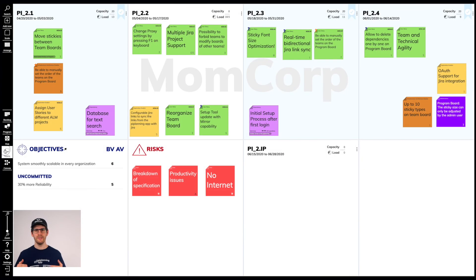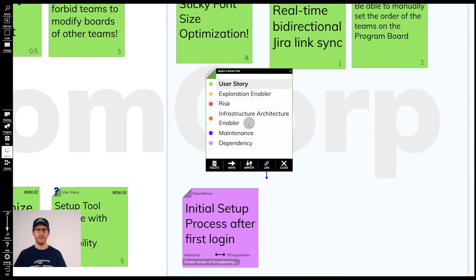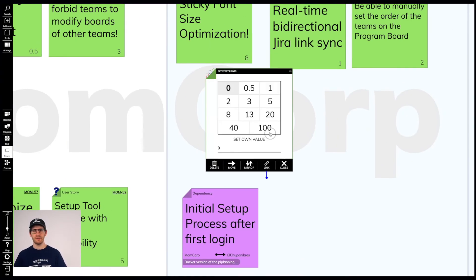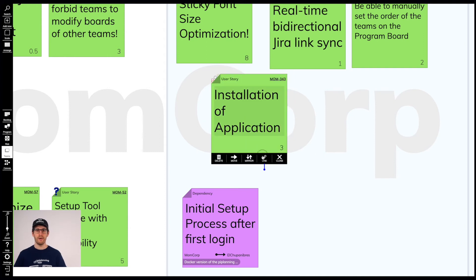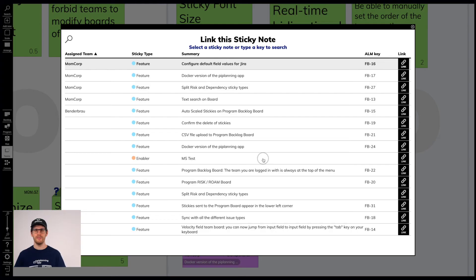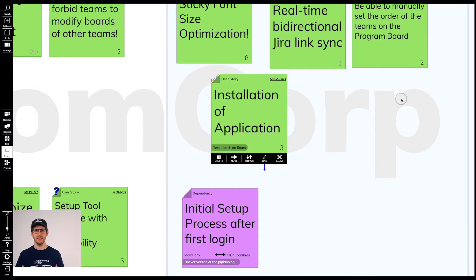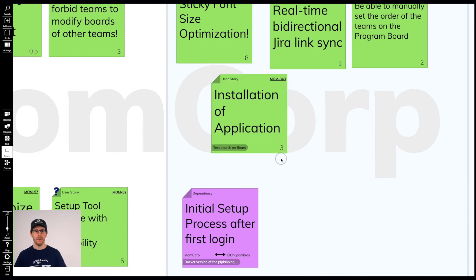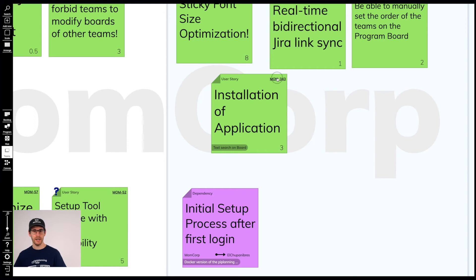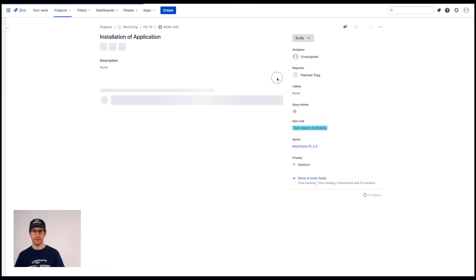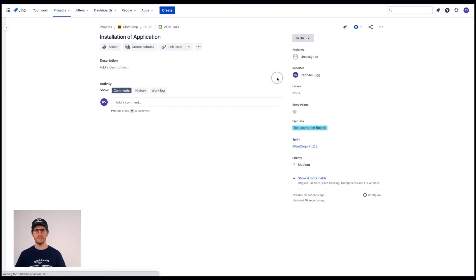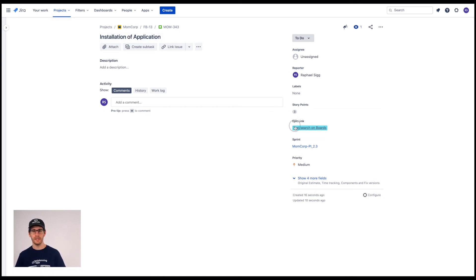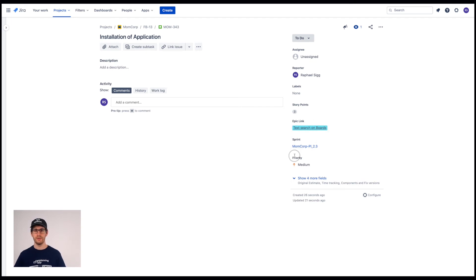We go to our team board, create a user story, give it a story point value and link it directly to the feature that we assigned to our team earlier. We make everyone aware that this user story already exists in Jira now, that the ALM key is a direct link to Jira. So, this is the story we have just created with the summary, the story points, the link to the feature and in which iteration we planned it.